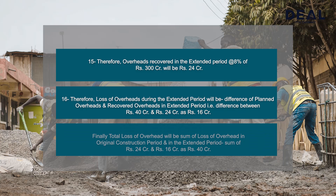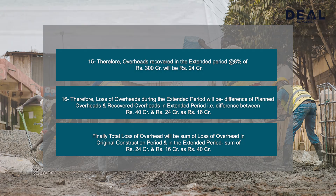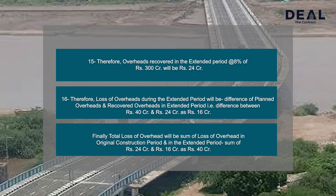Finally, total loss of overheads will be the sum of loss of overheads in the original construction period and in the extended period: Rs. 24 crores + Rs. 16 crores = Rs. 40 crores total.